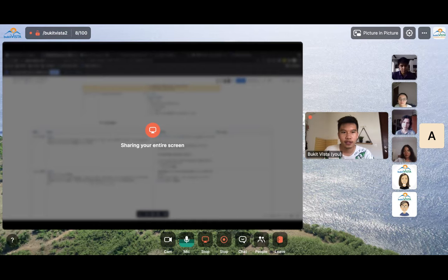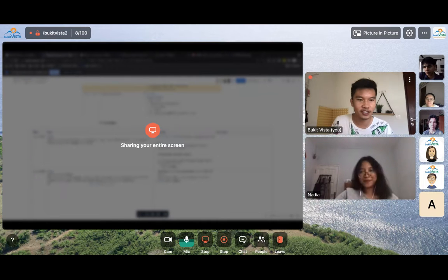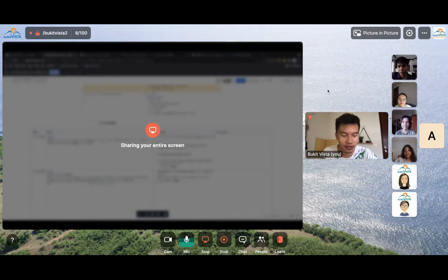Let's try to create, shit, I forget the term, the release train. So basically, we will have a schedule for release. We will release it anyway, even if it's not perfect, and we will celebrate it because we release it. So I think that would be easier to implement in the beginning to get this culture going. Nadia, let's do a sub discussion about this. Yep, I think we need to improve this culture. Sure, sure. Okay, please invite me to that discussion. Okay, we spent most of the time talking about this discussion, but I think this is worth it.